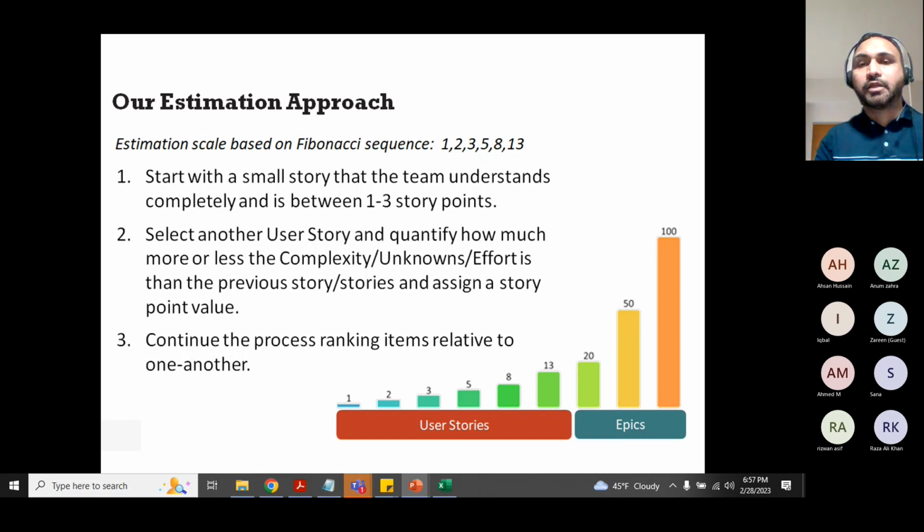But my agile coach used to say, keep in mind there is one resource, one developer. For example, if you have team members of 7, which is ideal, 7 plus or minus 2, meaning it could be 9 or it could be 5. But I'm not going to go into the team size discussion, I'm talking about story points. If the story has 13 points, that means one team member is fully allocated, maxed out, with one user story. Don't give any other story to that individual. Only this way can you deliver that story. If you assign multiple stories to that individual, it's definitely a failure. They will not be able to deliver.